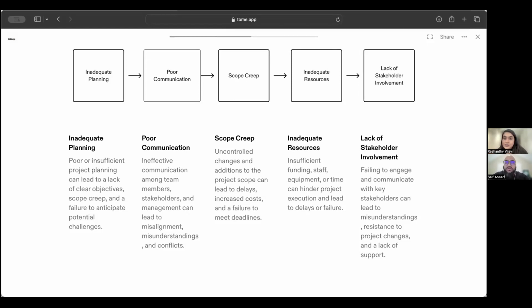So on the side, you will work with the people that you need, mostly tech leads and architects. And you'll work with people that give you some padded estimates. Hey, this is going to take 3 months, because they want to give themselves a little bit of time. So as a project manager, you have to ask questions. And when you get answers, you have to keep them honest, maybe validate those answers with other tech members. It really depends, but never take anything at face value. You have to do your checks and balances, always double checking everything, making sure everyone is keeping everyone honest, basically, right?